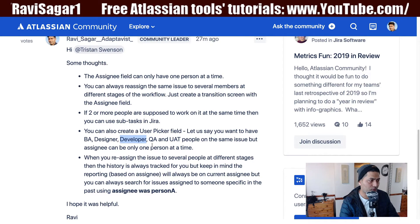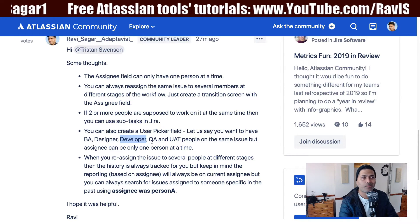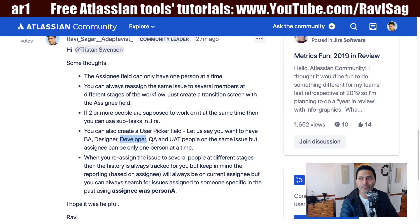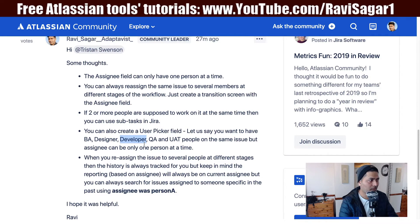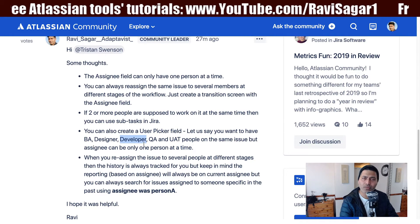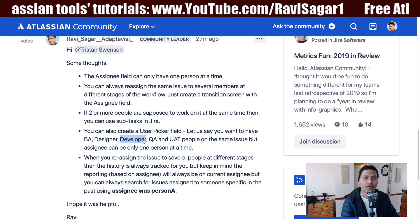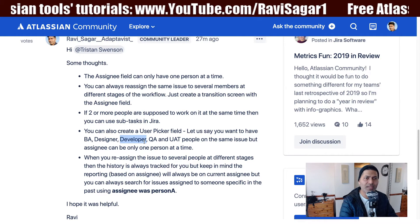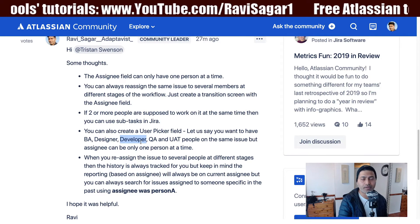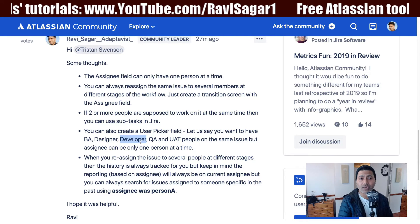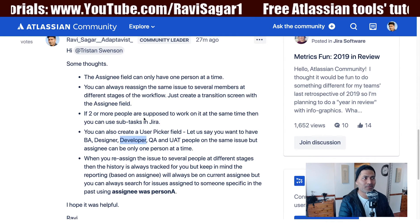The last option, which is probably the best approach, is to break your task into subtasks. If you have a story or any issue in Jira and multiple people need to work on it, create two or three subtasks within that issue and assign each subtask to a different person. They can work in parallel on their own activities, and you consider the parent story complete when all subtasks are done.